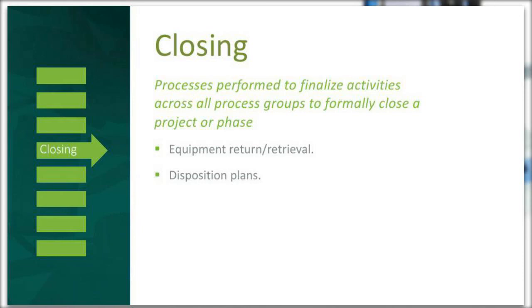Because we've had clients that have come to us and we have found buyers for their equipment for them. Unfortunately, it took so long to dot all the I's and cross all the T's on the back end that the buyer had to back out due to the time that it was taking. And these were not, let's say, inexpensive pieces of equipment. And honestly, they had never been used. They were still sitting on their shelves. And then they end up having to be given away,